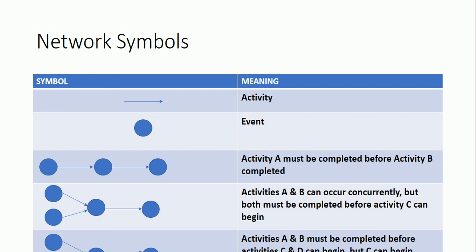Here, Activity A and Activity B can occur concurrently, but both must be completed before Activity C can begin. In another arrangement with three arrows and four nodes, Activity A and B must be completed before Activity C and D can begin, but C can begin independently of D.